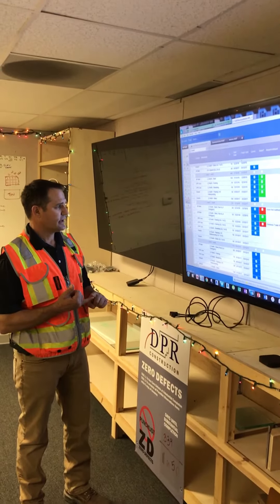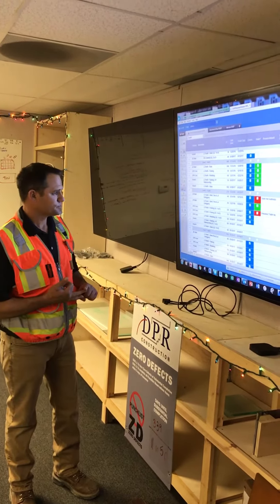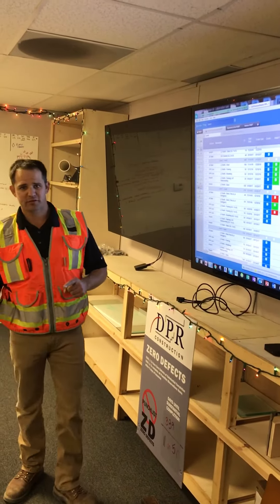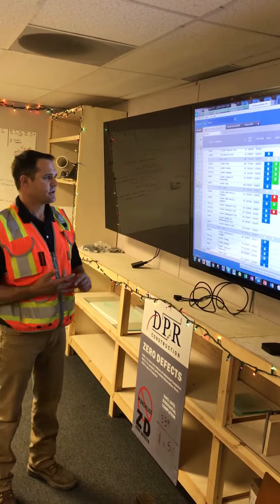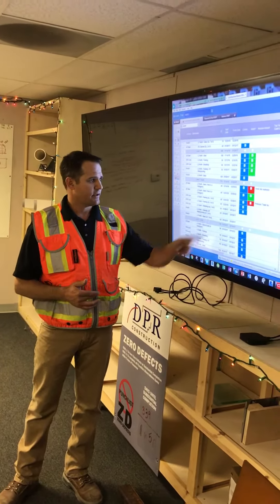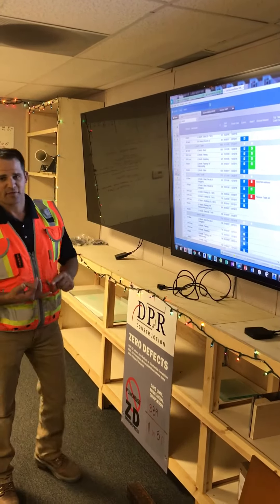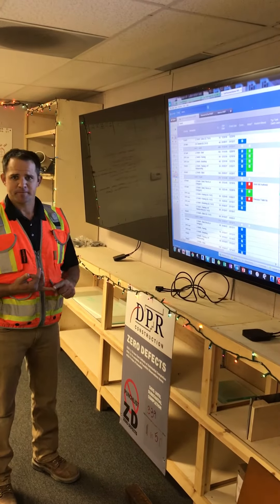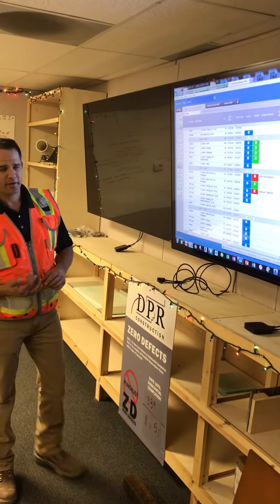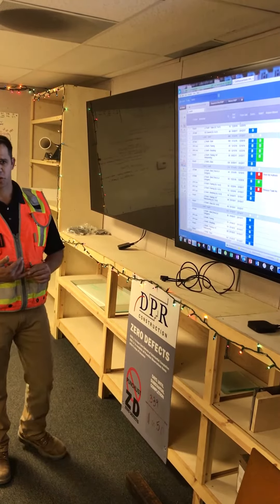It actually has an app for the iPad and iPhone, which is really cool to see in the field. It's very quick at our morning meetings and weekly meetings where we sit in and make changes quickly. We track work completed and commitments, and this is actually uploaded to Power BI. We still have our graphs with our PPC and it gives us our reasons missed, so we're still able to track that data. Really cool software — we're trying it out on this project and so far it seems to be working really well.